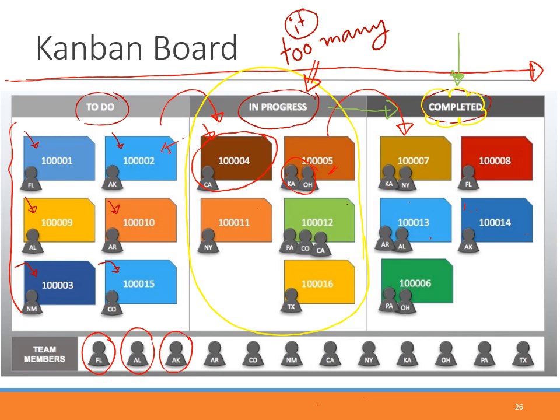For example, if we impose a rule of not more than 2 works at a time, this person can work on at most 2 works in progress, no more, because when you are working a little bit on this, a little bit on that, a little bit on the other thing, you are not finishing anything. And the value of the work we consider only when we finish it. Work in progress has no value in the Agile mechanism, and maybe also in many other real-world situations as well.